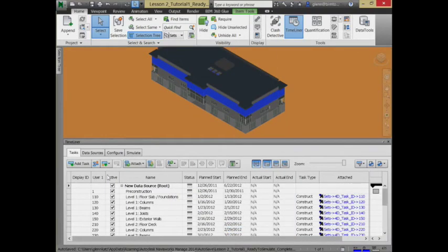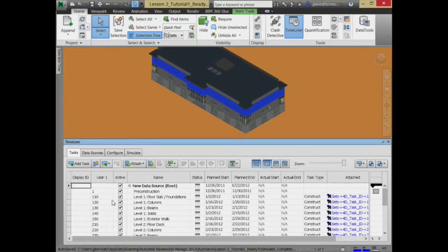There we go. I actually have a field set up here, which is a bunch of different task IDs, and this is just set up in the CSV file. What I would try to do is associate a number with each of these different tasks. The reason I like to have a task ID is I can then go to Revit and associate that number with each of the different Revit items, and that'll make the link between everything. So if in your schedule you have different ID numbers for every different task, you can use that and tie everything together.